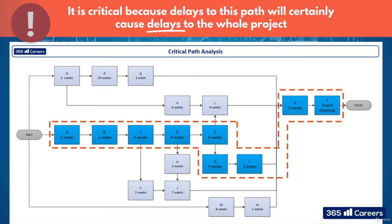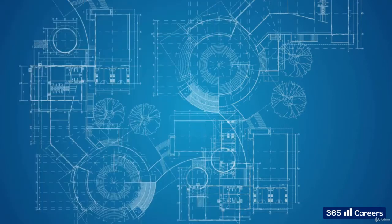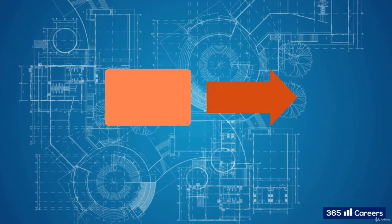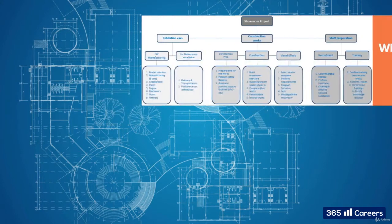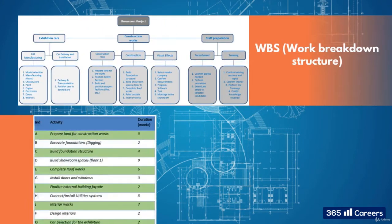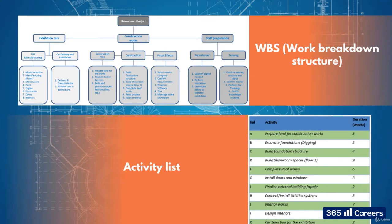One of the best ways to plot the Critical Path is to put the information in a network chart with boxes and arrows. This works well because it shows all the tasks and all the durations in the boxes and all dependencies, making it as easy as pi to chart a critical path. Using our work breakdown structure and activity list, let's begin.